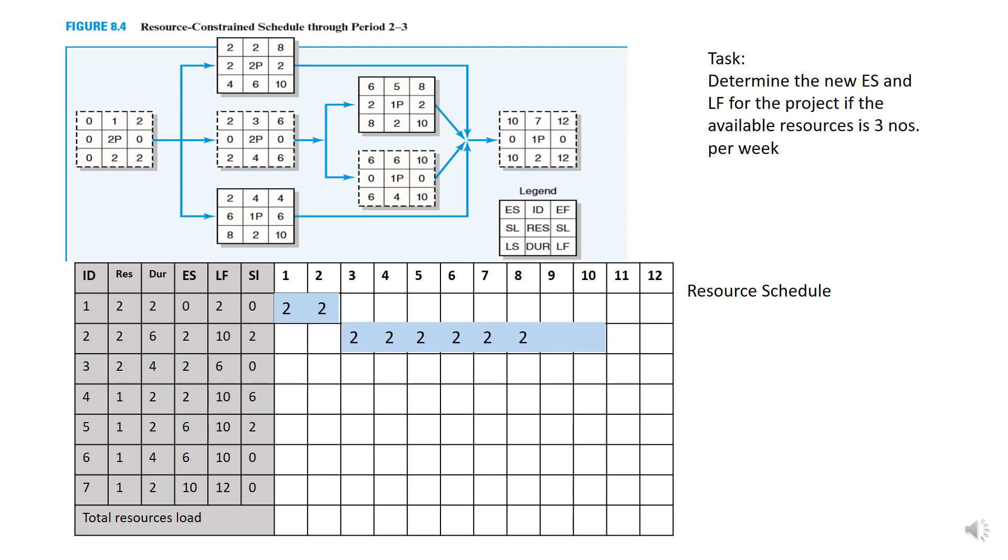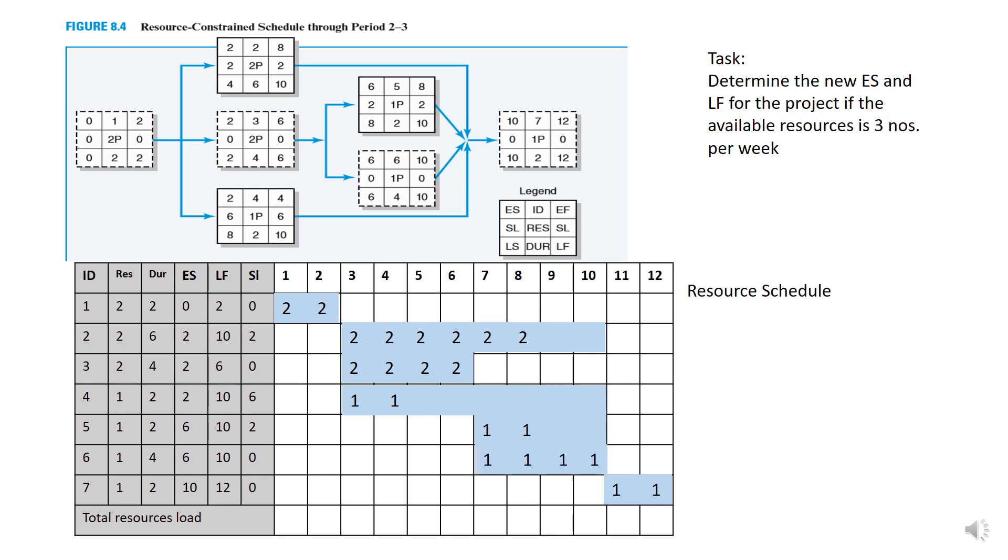Activity 3 starts on week 3 and completes on week 6 and so goes to the rest of the activities. So at the bottom of the table, you need to determine the number of resources for each week.